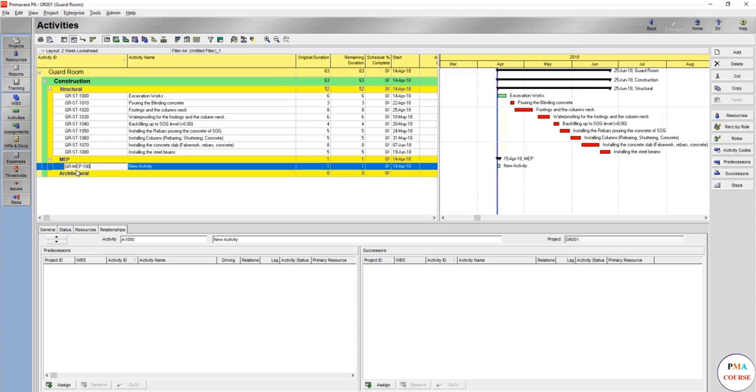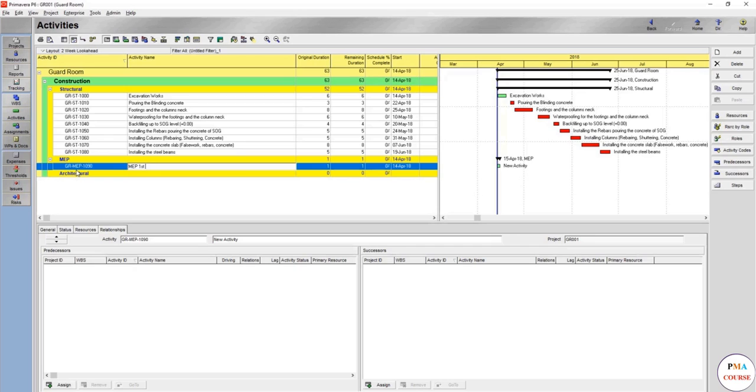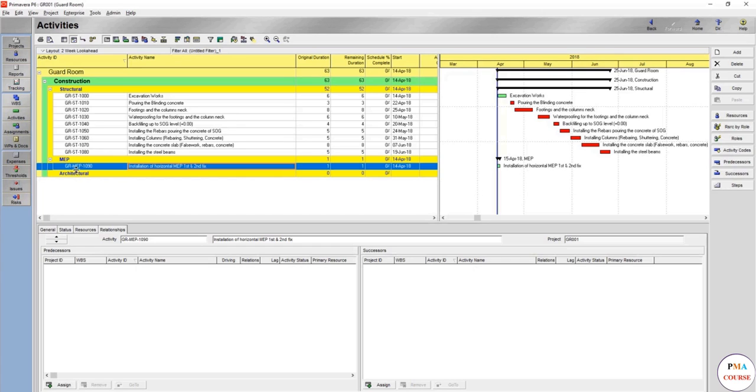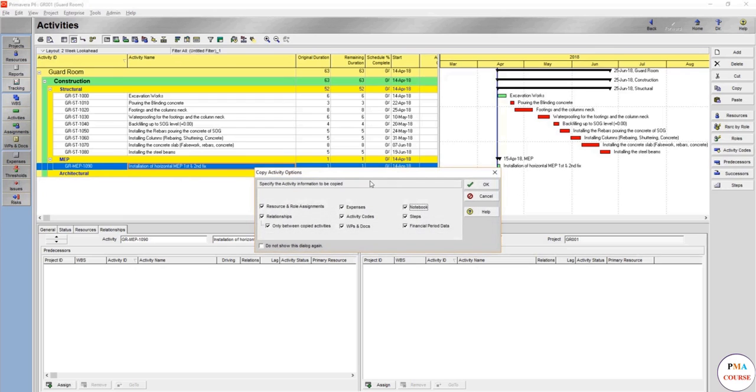In such case, we would name it MEP first and second fix. By meaning first and second fix, it's meaning the supports, hangers, and pulling of the cables, for example, for electrical works. First and second fix we might make it horizontal, which is above false ceiling, for example—installation just to make it as an action of horizontal MEP first and second fix.